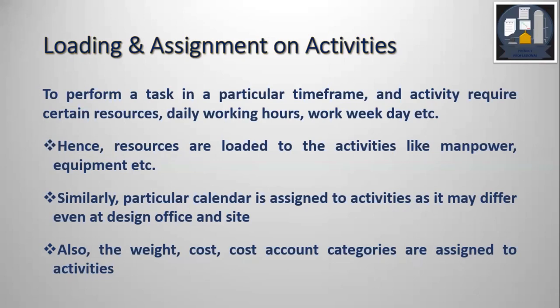Similarly, calendars are also assigned to activities. For Engineering activities at the home office, the working hours and working week may be different from the site. So different calendars apply for the home office and for the site. The manufacturer may also follow another calendar. We also assign weight, cost, cost account settings and other things to the activities.